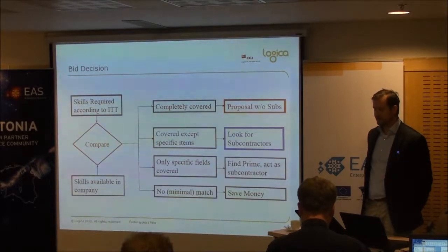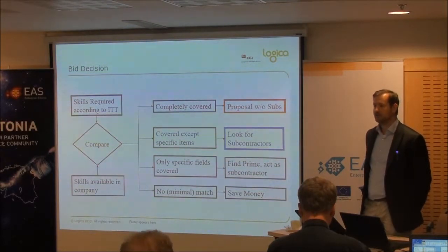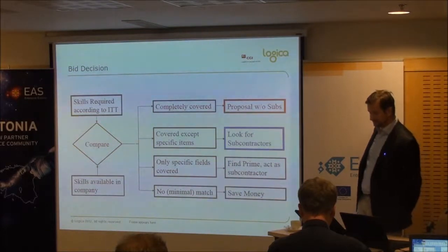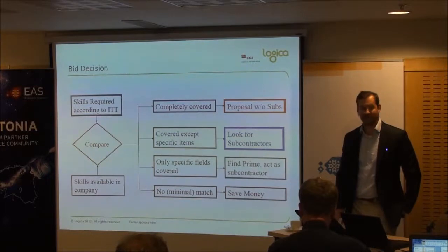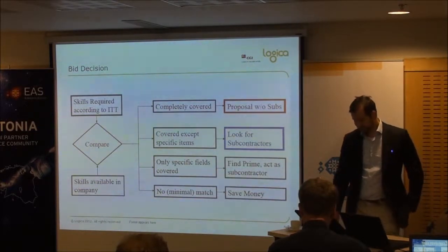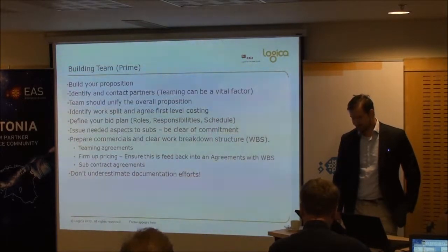But at this moment, if you're building for PECS and you don't have an idea already, then you should get one quite quickly, because the bid time, something like 4 weeks, will run out very, very quickly. Particularly if you have to work with another organisation, because you will need to get contractual terms in place between yourselves and be very clear on how you're dividing the work. And really, if you don't have much chance, stop. So that's something to think about in terms of your overall mechanics.